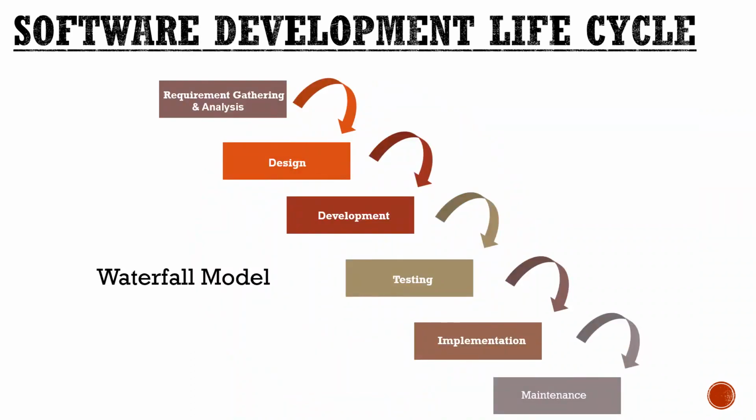Next, we are going to see the waterfall model of software development lifecycle. In this waterfall model, as we saw from the previous slide, each phase should be followed step by step, and we cannot carry on to the next step without completing the initial steps. So suppose when we do requirement analysis and then follow with testing activity, it cannot be done in this waterfall model of software development. This is the main disadvantage of the waterfall model. To overcome this, we use agile process management.